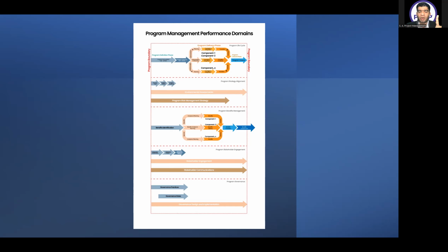In the project lifecycle, what we have studied in PMP, if this is the project boundary, the first document is the project charter. This is the first document I'm making in the project boundary, right? In PMP, the project business case is part of need assessment, which is actually done outside of my project boundary, and which is covered under the PBA certification, where we do the need assessment. Why do we need to start this project? We have options number 1, 2, 3, and 4, and we are analyzing everything. From the PMP perspective, the project business case is outside the project boundary, and my first document is the project charter. Agreed? Right.